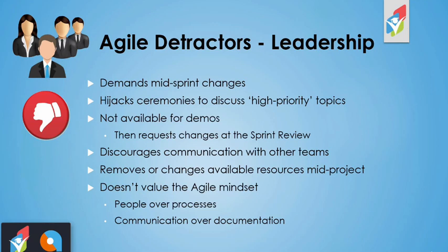Instead, that leadership should recognize that, you know what, yes, this change is important. Let's make it the number one priority in our product backlog. So when we're planning our next sprint, which starts in 1 week, the team can start working on that and get that completed, hopefully by the end of that sprint. So you're only waiting 3 weeks for that change, where in a waterfall, you'd be waiting months and months and months, if not years. So it's really important for that leadership that they don't demand mid-sprint changes, or they really, really think about it.